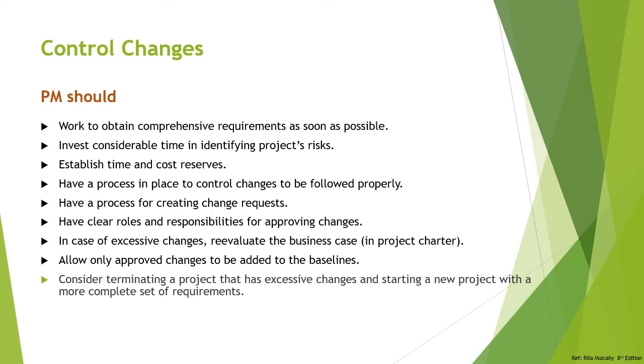So it's always better you terminate a project and start a new project, because with so many changes you will neither be able to complete the project on time, nor within the budget, nor within your defined scope. So in case of excessive changes, it is always advisable to terminate a project, reinitiate it, replan it, and start a new project with a new project management plan, right?